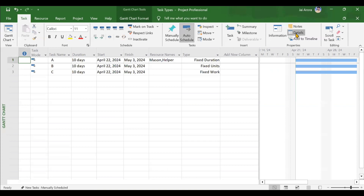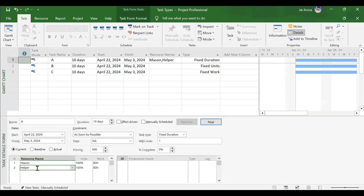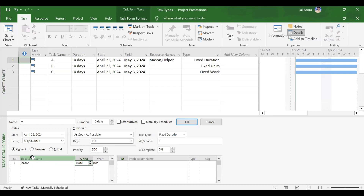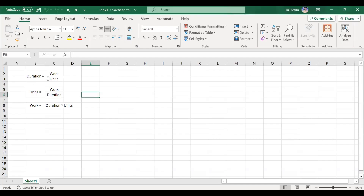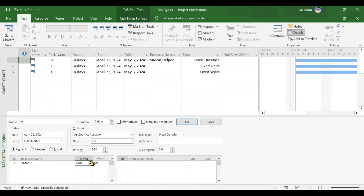Now the second case for fixed duration: deleting the helper and increasing Mason's units to 200%. Since this is fixed duration, duration remains 80 hours. Using the formula: 80 × 2 = 160 work hours. Increasing units to 200% confirms work becomes 160 hours.